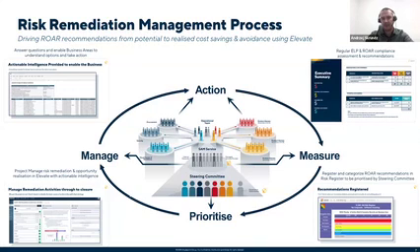What needs to be done to mitigate the risk? And each response is attached to each scenario, and that's how we manage it. We determine the due date. We determine who is the scenario owner, let's say the task owner, who should be responsible for that. And that's how it's done, basically.